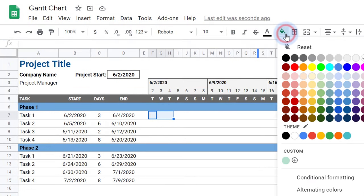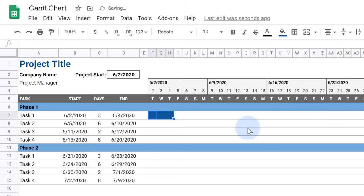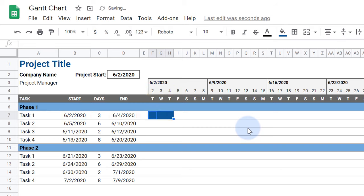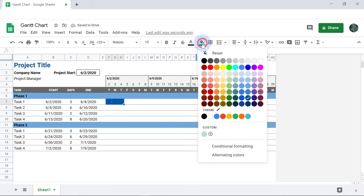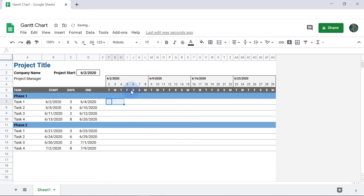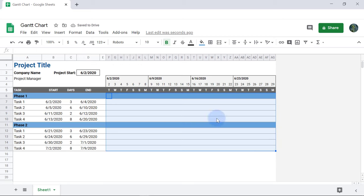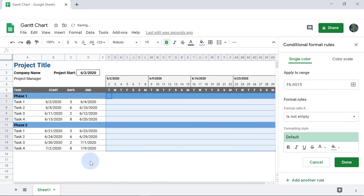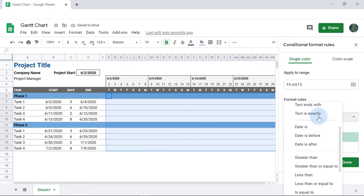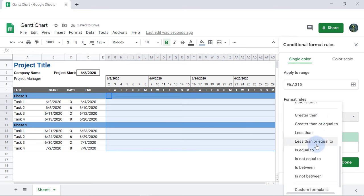We could add bars by filling in the chart manually, but that's way too time consuming. So instead we'll use Conditional Formatting to fill in these cells when the dates at the top of these columns are within the Start and End dates. First we'll select all of these cells and go to Format, Conditional Formatting. Under Format Cells If, I'll select Custom Formula Is from the drop-down menu.